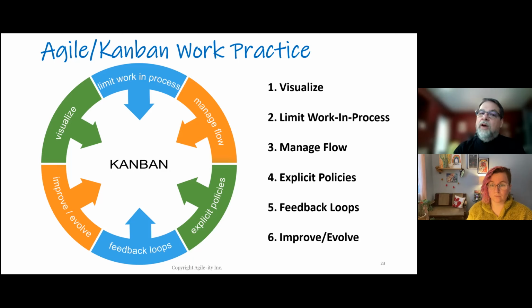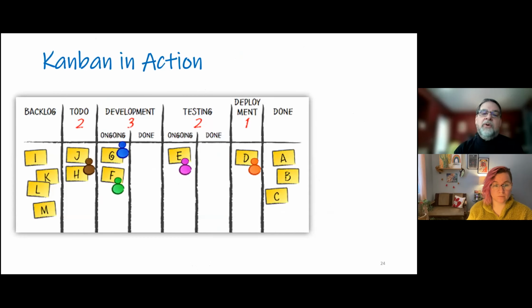So there's many things that map directly from here into Scrum. And so I actually have all my teams do their work from the team backlog through getting it done. You'll see how this works here: we have the backlog, we have our to-dos for the next sprint, we're in development, then when we're done developing, we're going to test it, we're going to deploy it, and then we're done. So this is a Kanban because it's staged workflow. The other thing is those red numbers limit the amount of things that I can have in any one stage. So it forces me to focus.